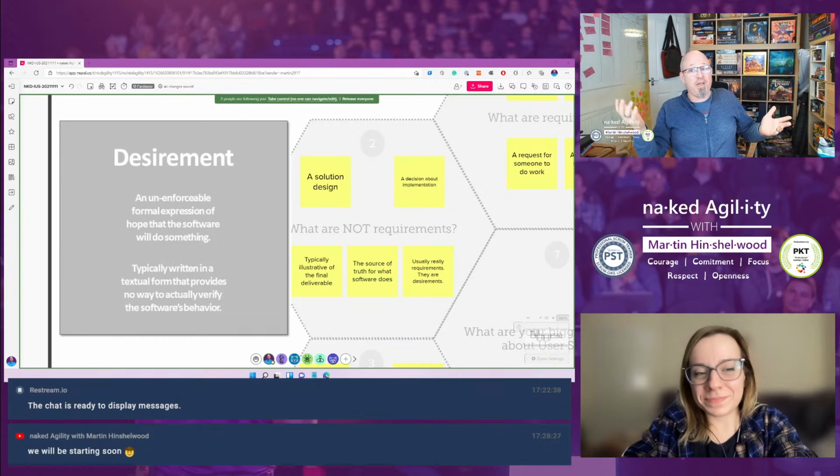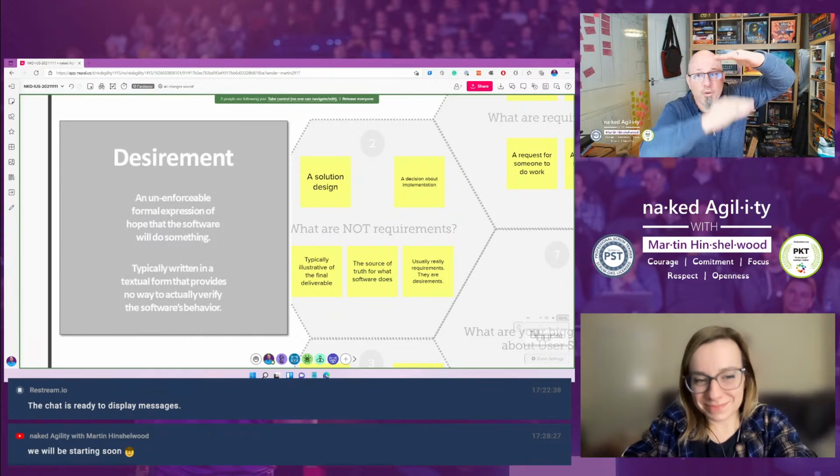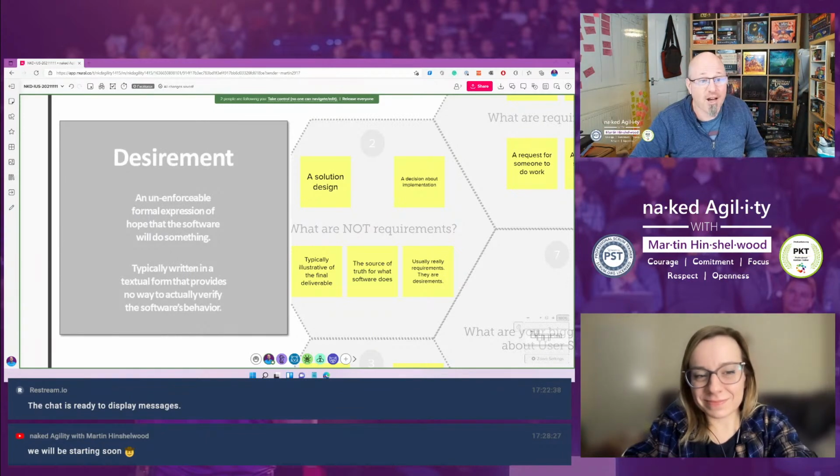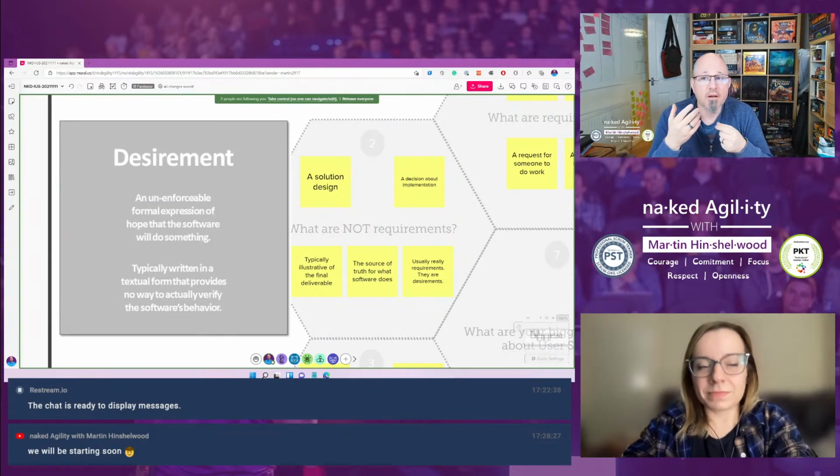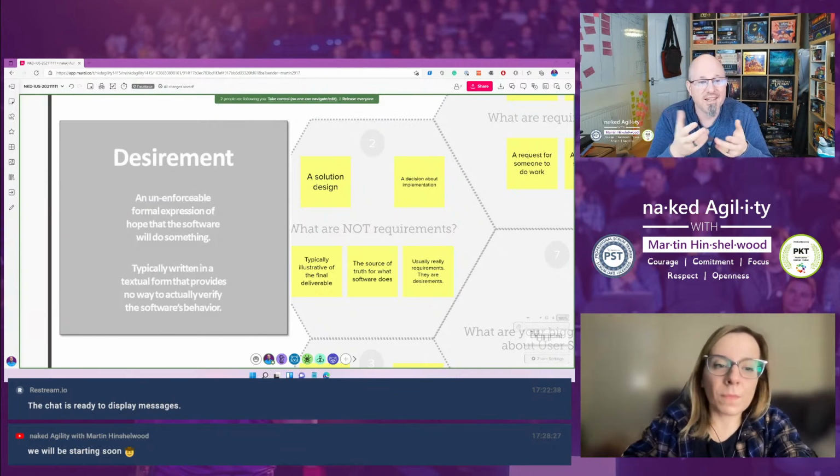But in the digital space, we've got an infinite amount of card on every card. So sometimes it's very easy to see too many things listed. So when I do exercises with teams on breaking down backlog items, I'm looking at what they're creating, and if there's more than 4 acceptance criteria, I might start giving them a poke and saying, should this be 2 things?